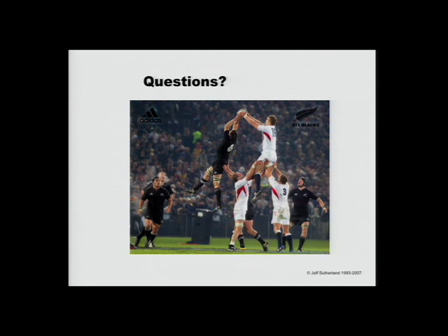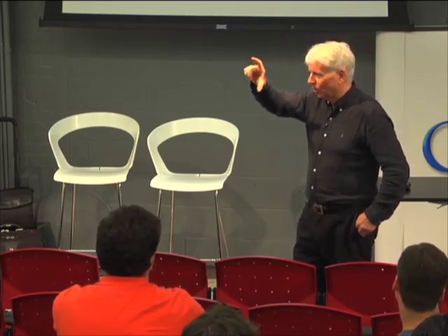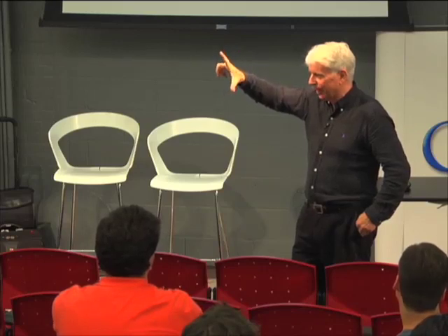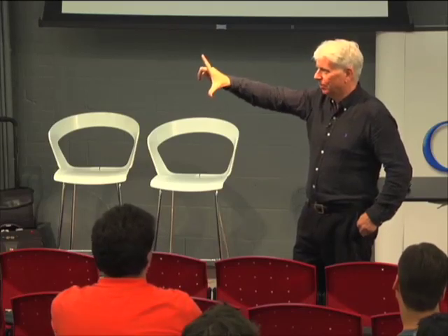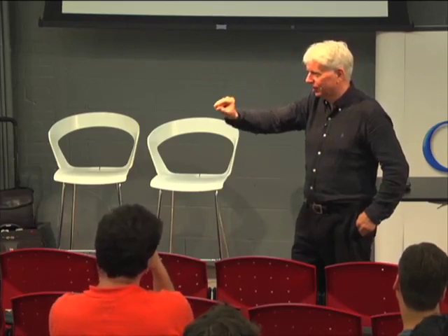So that's what Mark tried to teach the AdWords team, to try to measure the burn down of tasks, but measure the burn down of completed stories as well. And if the gap starts to widen between completed stories and tasks done, immediate problem. If you keep both of those running right together, you'll come into the end much better. You'd think that really smart people would figure out how Toyota works and actually incorporate it into their practice, wouldn't you? If you're really smart, you would figure that out. And then you'd operate accordingly.